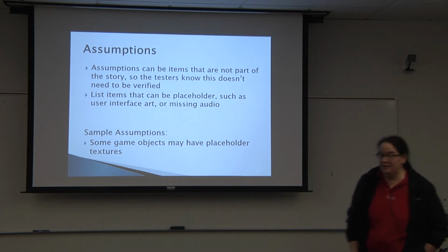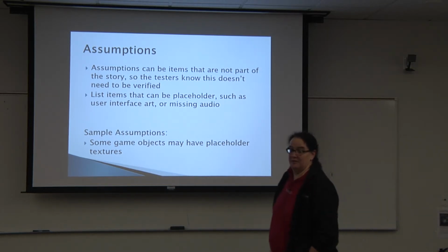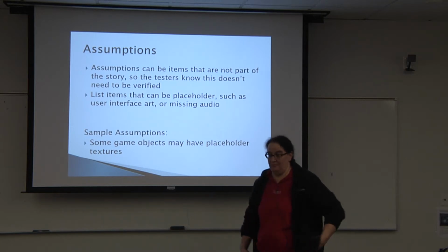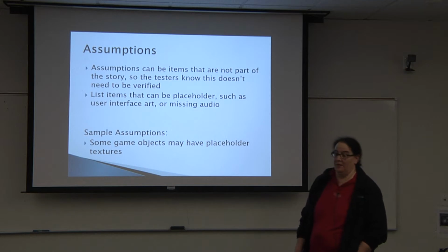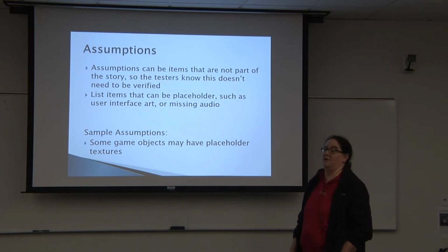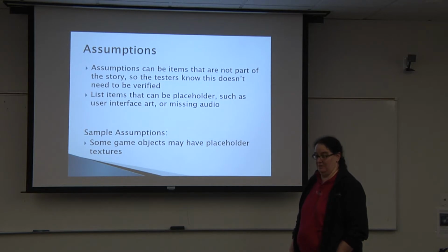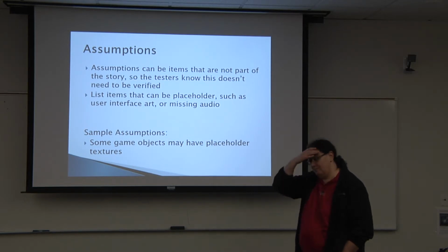As an example, in a project I'm working on currently, I need to be implementing movement, and we intend to have our movement system go through an action list system. But we're not writing the action list system until later because we have more important things to work on now, so I'm bypassing that completely. But an assumption would be that there will be an action list system to handle this specific thing. Just make sure it's also in your backlog, because that's the kind of thing that gets lost.